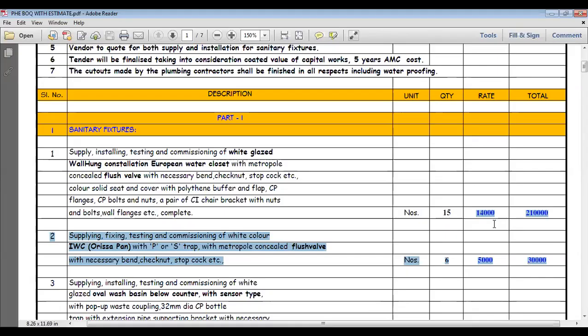If you are working as a consultant, you have to compare all the vendors and then recommend the vendor to the client. Suppose you are floating the tender for a contractor. The contractor will quote their rate. After that, you have to finalize 3 or 4 good vendors and recommend the vendor to the client. The client will negotiate the price and everything. After the negotiation, the client will finalize the vendor. So like that, a lot of process is there.